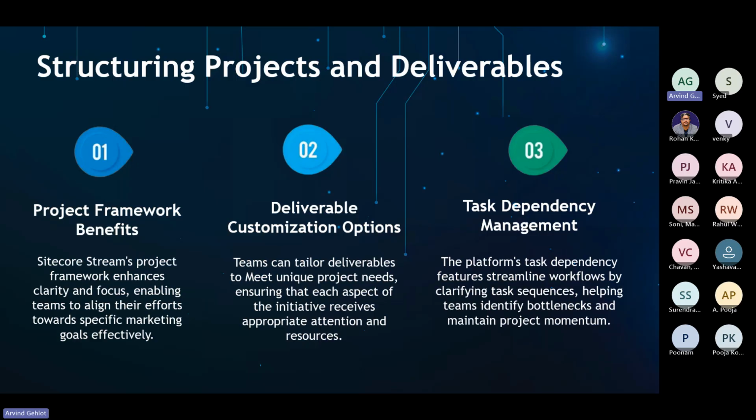So at first level, we have project. Under project, we may have deliverables, and after that we finally have the efficient task dependency, where the project manager or organization can go a little deeper into each deliverable and can create a task or subtask for the entire deliverable. It is similar to Jira, where we create the project, under the project we create stories, and under stories we create subtasks.